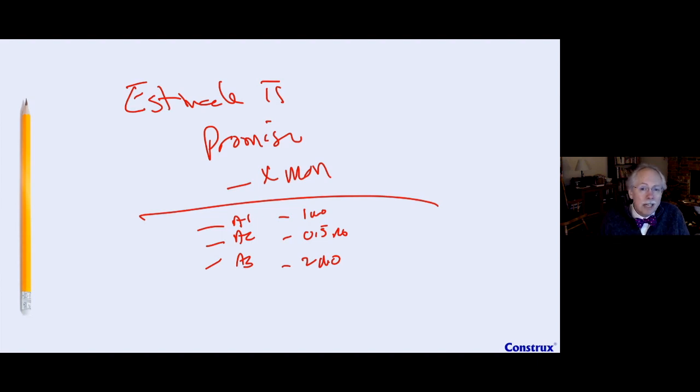Because what typically happens is that to come up with a number that the organization likes, you have to make a lot of assumptions. We're assuming this is true. We're assuming this is true. What this is down here is my list of assumptions that if they happen to turn out to be true, we will bring in the schedule, or bring down the cost, or deliver more stuff, right? But if these turn out not to be true, then we don't get that savings. And the number they're listening to is the promise number. So instead of plus minus, I like promise, and then minus if I have to present it that way.